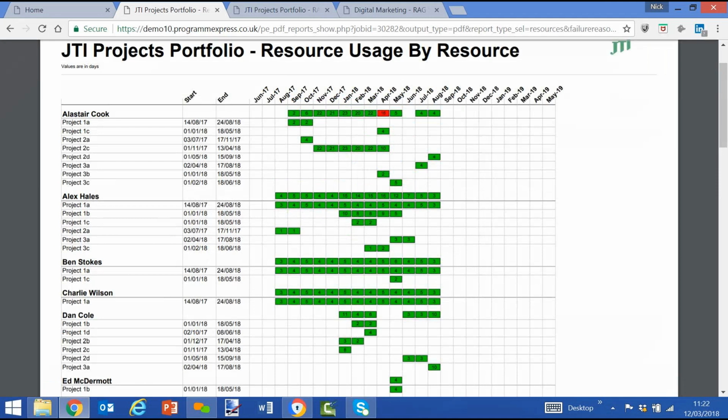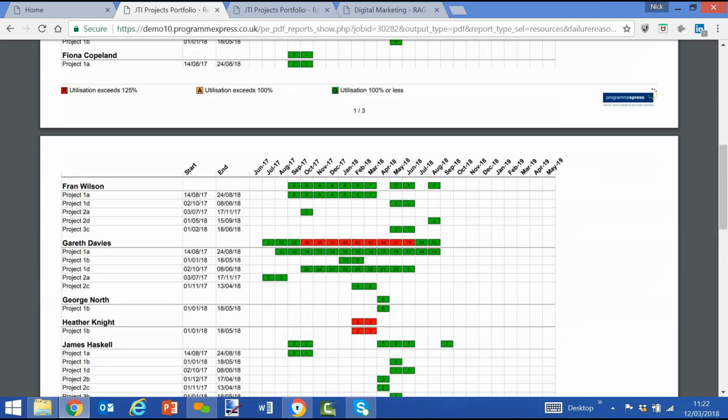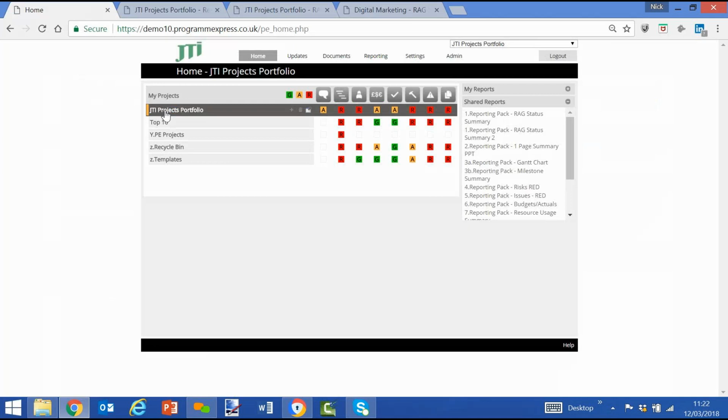And that person who's over allocated for that month, probably over allocated because they are not deemed to be available full time, maybe only 3 days a week on project activity because they have a day job. So it will flag that up, and it will also flag people who are very over allocated just because everybody wants them on their projects. But remember, we've just added these people to the project very simply. And the whole idea is that we do just that.